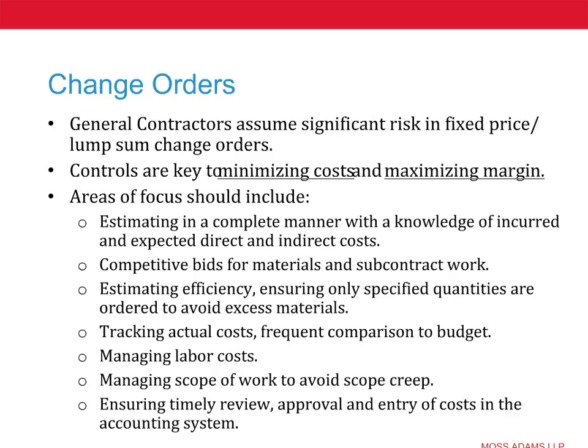Yeah, and I would ask Curtis here that the minute you have an inkling, like Jeff was talking about, that you're going to have a change order occurring, an event has occurred, follow everything he's talking about here just as soon as you have that inkling. Because basically, in order to recover change order costs, you have to be able to first identify the change orders occurred.